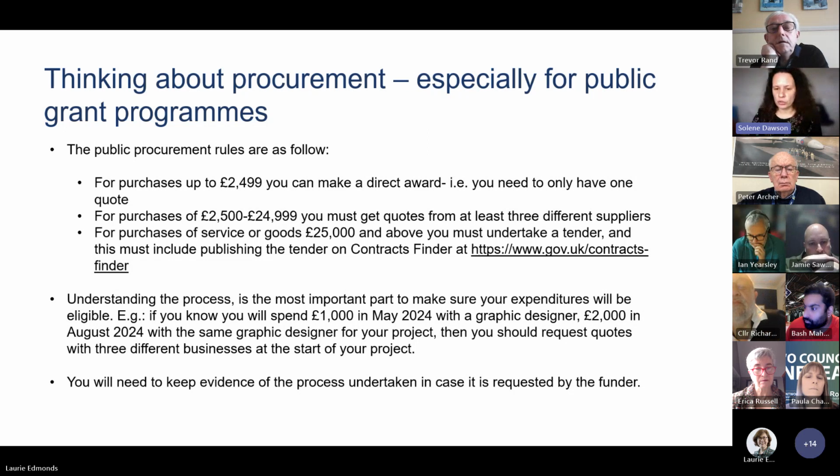And you're planning on using the same graphic designer for the project. Therefore, you should request the quotations from 3 different businesses at the start of your project. You can't split the contract to make it work for yourself, because you'll be spending £3,000 over the course of the project. And that's true for everything.